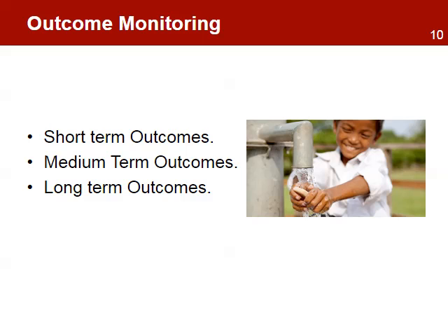Monitoring the results of project implementation at the outcome level is a core task of results-based project management. Outcomes are the changes that have been influenced directly or indirectly, partially or totally by the outputs of the project. Outcomes can be monitored at three levels: in the short term, medium term, and long term.